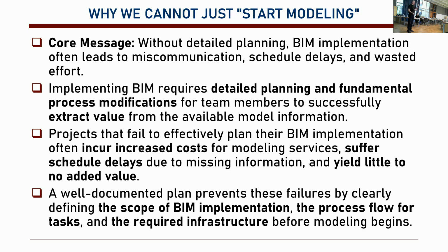Then you take it back, you organize the spaces again, then you give it to the mechanical engineer. The mechanical engineer will then look into the need for space underneath the structure for heating, ventilating, and air conditioning.